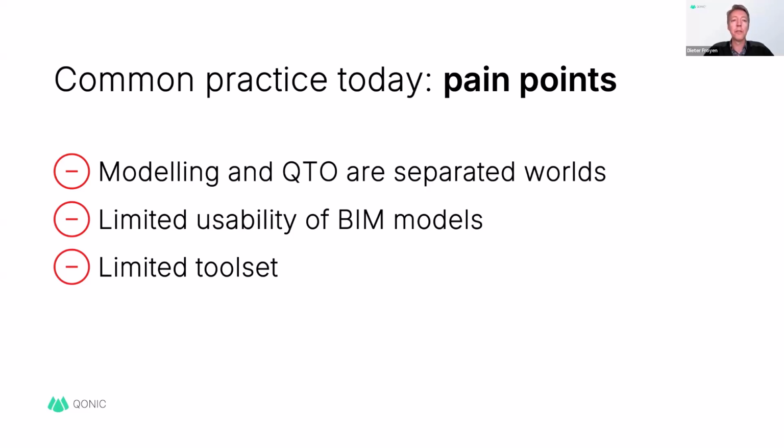What if you want to calculate the weight of an element, or the area of formwork? And you have also different measurement rules. So if you want to calculate a gross or a net area, then you want to set a threshold for the openings.